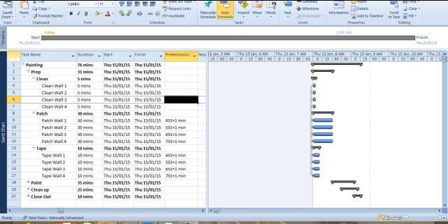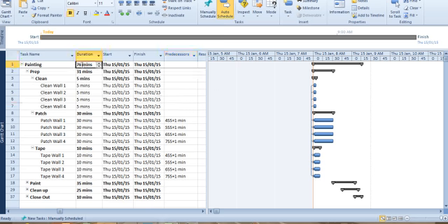Okay, how'd you go with the answer for that challenge? Why has our project's duration gone down from 80 minutes to 76 minutes, even though we've added 8 extra minutes of lag? Simple. It's because we've used the start-to-start relationship rather than the finish-to-start relationship on those activities.